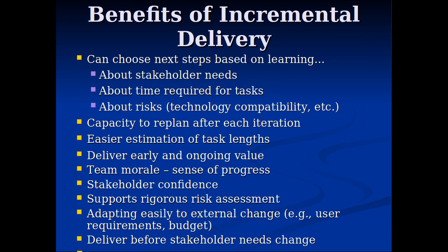I mean, that's part of your deliverable. I view that as part of a good deliverable. You checked out a risk and you crossed it out. Because if you were to go later and you're using Node.js and Spark as your core technologies and you can merge them together, you sure as heck benefit by knowing if they don't play together from the start. You want to resolve that risk. You want to put that risk to bed so you can head forward with confidence. Does that make sense?